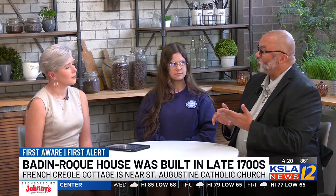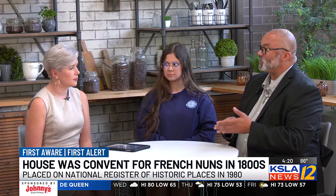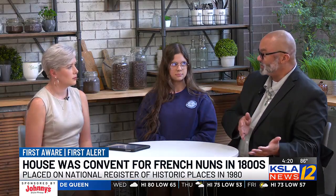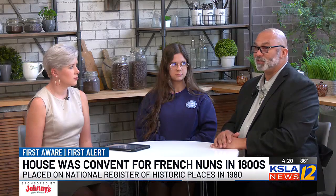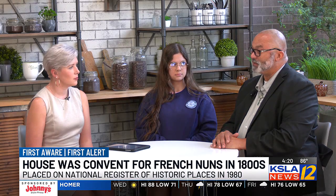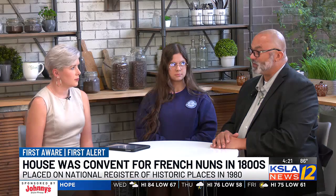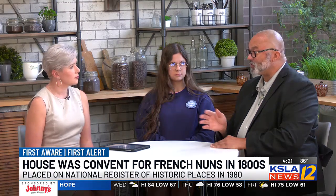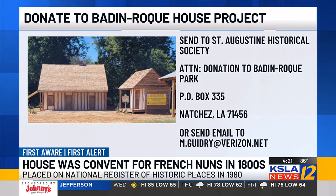But our biggest challenge, though, was funding. Because in the post-COVID economy, once we got started after COVID started, the cost was a lot higher. So that was one of our biggest crunches. And who came to the rescue really was the 2023 legislature under former Governor Edwards, and they allocated $400,000 to help us complete it. Wow. So really just a lot of teamwork to make this all happen. A lot of time, a lot of effort, and a lot of collaboration.